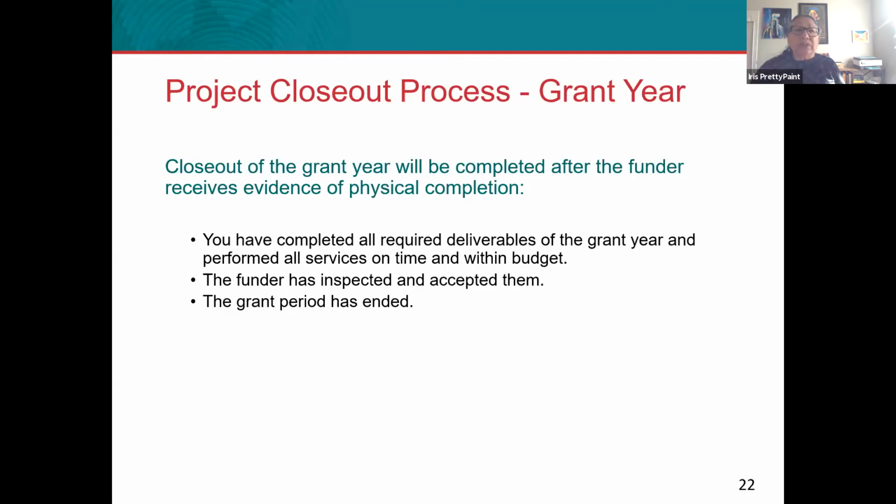As you're doing that, you're going to be tracking the amount of time and labor that it takes to do those things, and that all impacts your budget. So when you have a deliverable, you should be able to look at it, and as you monitor it, find out basically how much it cost you to create that deliverable, including the labor and other direct costs. That's how you're able to see if you were on time and within budget, and then you'll start to hear people talk about the quality. So you want to have that in the back of your mind: was this high quality, was it on time and in budget?